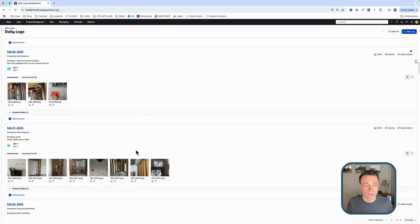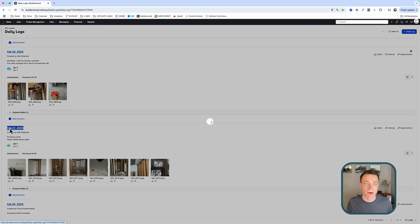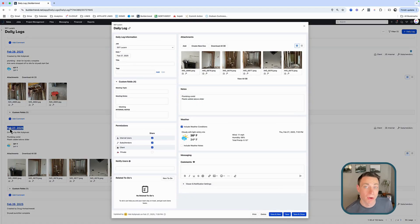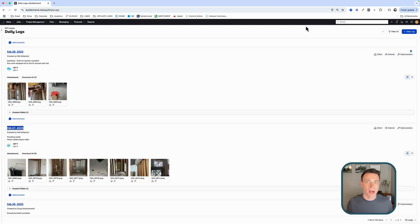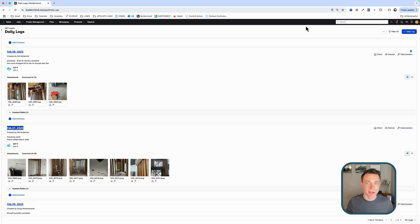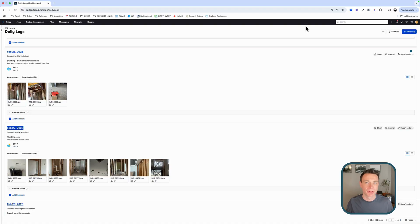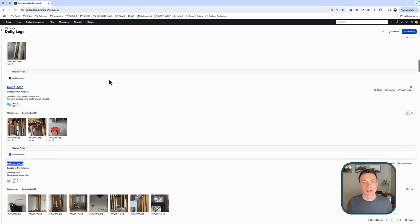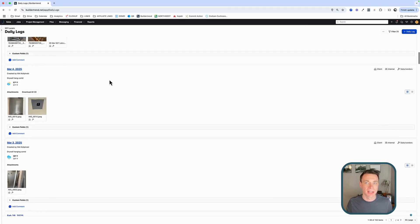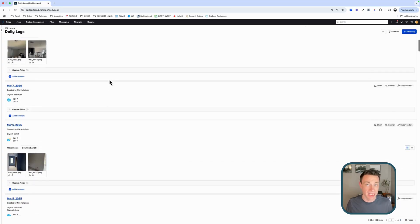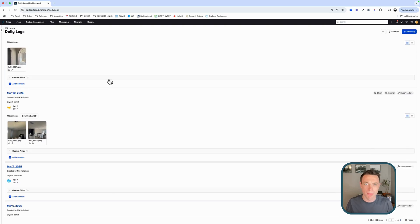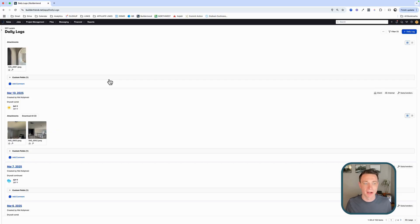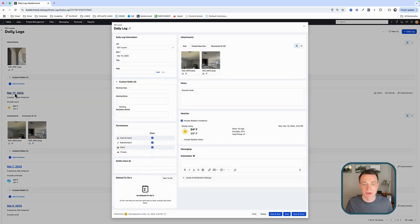I also would recommend that you create a policy where pictures are always encouraged. Pictures might be requirement if we're on site. So I say if we're on site or not. We might create a daily log where nothing's happening. It's a work day, but maybe we're waiting for concrete to cure. Create a daily log and indicate that. That way every single day, 100% compliance, you have something in there. Your customer can always reflect back. If you reflect back and you look at a daily log that's blank or a day that doesn't have one, did we forget or was nothing going on? What was happening here? If we train ourselves and our customers that every single day we get a daily log, us seeing that there isn't one means we probably forgot.